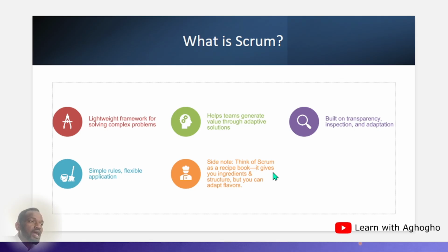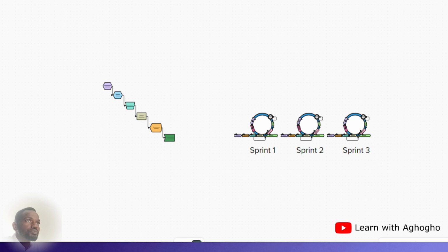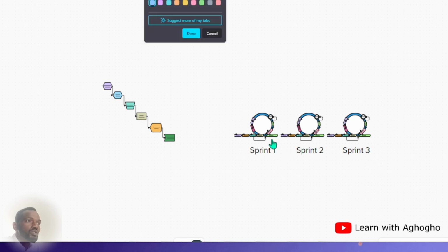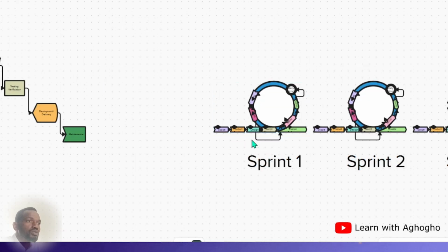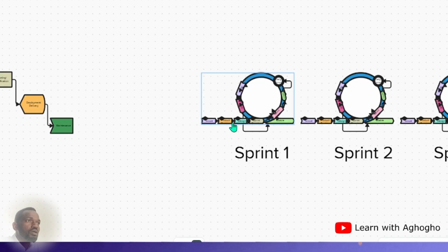They present to the stakeholder what they've done, and if the stakeholder has got any concern, they easily raise it in that very sprint. So if there is an issue, they raise it, and this is passed back into the product backlog for product grooming.